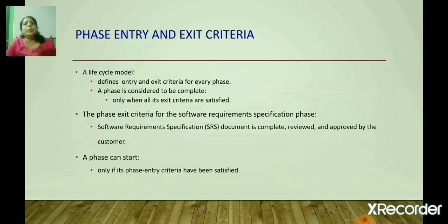For example, the exit criteria for the software requirement specification phase is the SRS document. When the SRS document is complete, reviewed and approved by the customer, then it will go to the next phase. A phase can start only if its phase entry criteria have been satisfied. Means a phase should satisfy the entry and exit criteria.